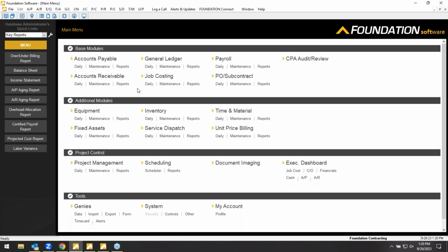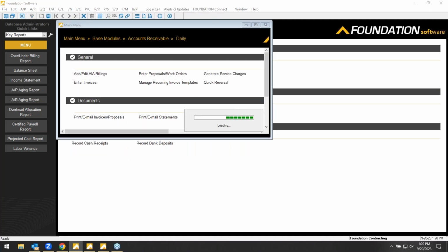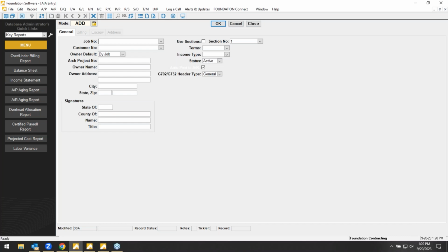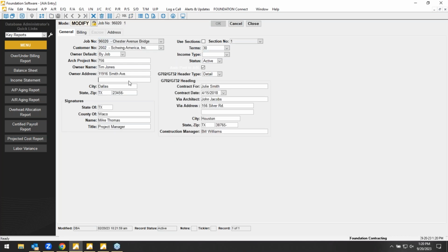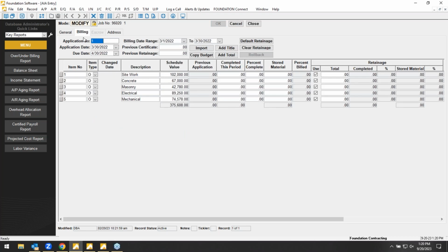And outside of job costing, when we're getting into the revenue side of things, just so everybody is aware here, this is kind of deviating from the accurate job costs. But you can see here, for those that run pay apps and AIAs, bill by dollar amount, bill by percentage, get those numbers in, default retainage, it'll pull right from the job.